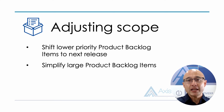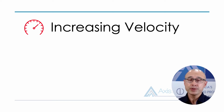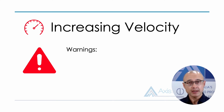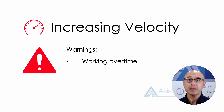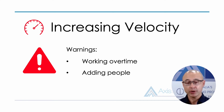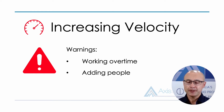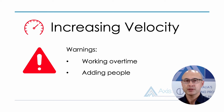If you can't adjust scope, then you'll need to increase the team's velocity. Two common go-to's that I need to warn you on: the first is getting the team to work overtime, and the second is adding people to the team. Overtime is certainly an option, but be careful — if you do it too often the team will get burnt out, make more mistakes, and can lose motivation. Use it as a last resort, not a first one.